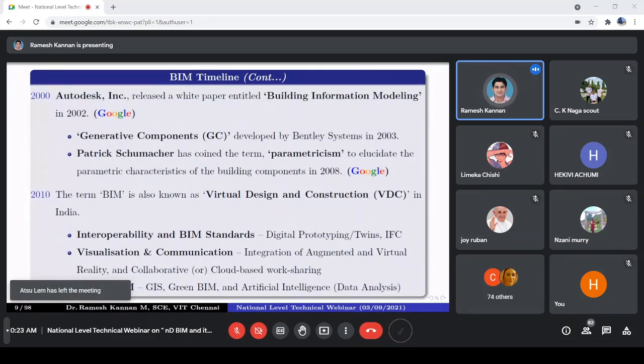So if somebody works in AutoCAD and makes changes in 2D, and somebody makes a 3D AutoCAD, then they have to make the changes separately. And then whoever takes care of quantity estimation also has to make those changes. If anyone misses, that becomes a hindrance, the flow of the project gets cut or becomes very poor, and it leads to a lot of chaos and confusion. So accountability for modifications and changes was very important, and BIM gives you ease with those changes. That term is called parametrism, right?